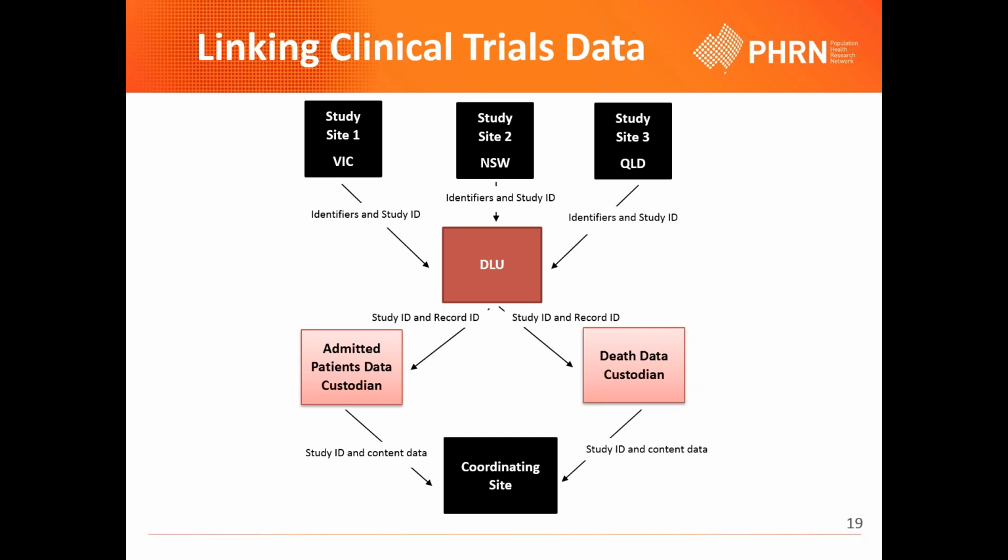Thanks, Felicity. Now, we've just had a question come in earlier from Lisa for you about what order the approvals need to be collected in. So do you need approval from the custodians and then ethics, or is it flexible? Okay, there are slight variations between jurisdictions, but mostly it's data custodian first and then on to ethics.